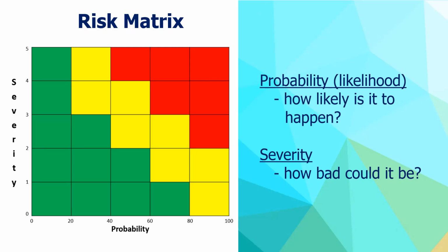What a risk matrix helps you do is to visually identify just how bad something really is for your business. It looks at how likely is it that this risk I'm looking at will actually happen, and second, if it does happen, how severe are the repercussions going to be? By using a predetermined way of evaluating just how bad something could be for you, you can compare risks across your entire business. And that allows you to figure out which one gets worked on first, second, and third.